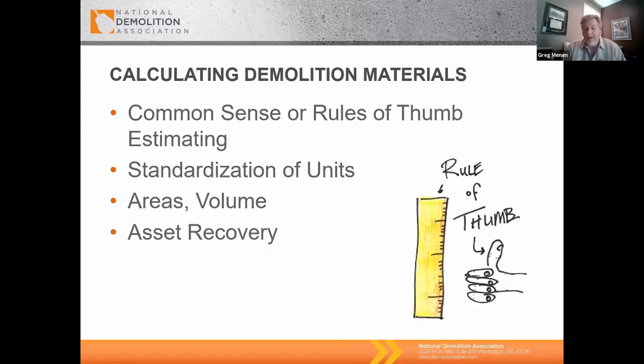And we talk about what's the actual means by which foundations are poured. We try and remind everybody that these drawings are written for an approval that shows what a minimum is. The amount of times that the contractor who built it back then didn't have the forms or weren't putting them in place and just dug the trench and poured the material in, and it met the minimum requirements, you have a lot more material, or you had a blowout. We talk about these quite a bit.